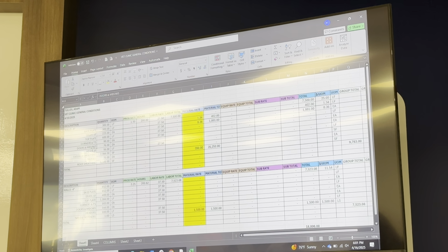Okay, so this is one of the last things they teach you, in my experience, as an estimator in the field. The GCs are at the heart of an estimate for a general contractor. The way I think about it is, if you're subcontracting most of your work and you get a bid for concrete for $500,000, you can pretty much count, if you did your job as an estimator, that at the end of the job you're going to spend $500,000 on that subcontract. For electrical, you get a bid for $1 million, and at the end of the job I bet it's $1 million to the penny that you end up spending.